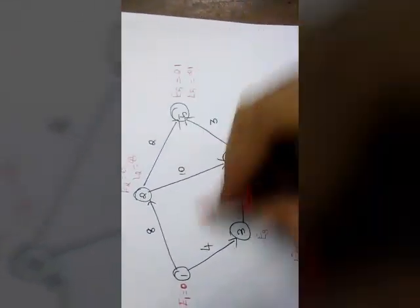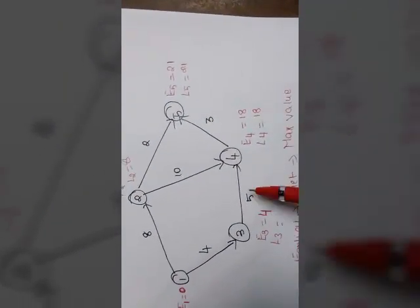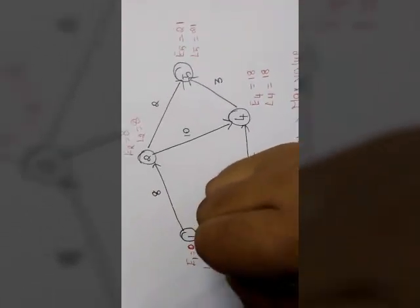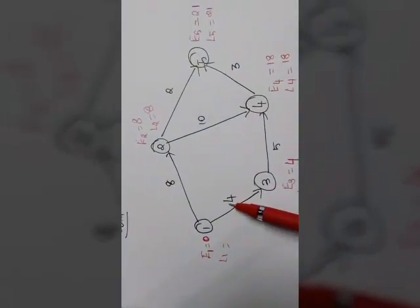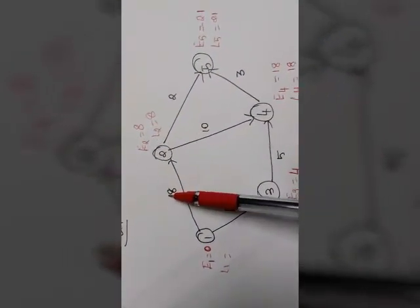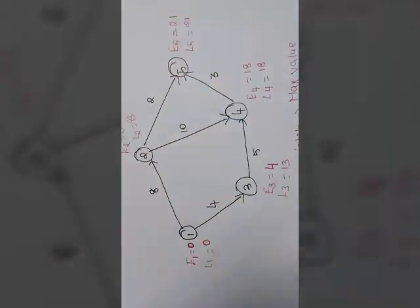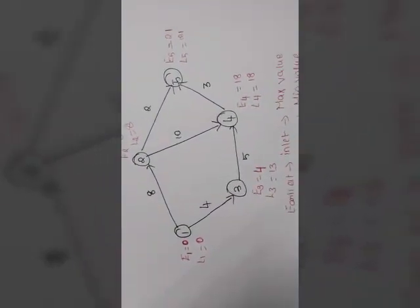So now L3. L3 is 18 minus 5 which is 13. Now L1. L1 will be 13 minus 4 will be there and 8 minus 8 will be there. So minimum value is 8 minus 8. Take it into account 0. So this will be your earliest time and latest time.